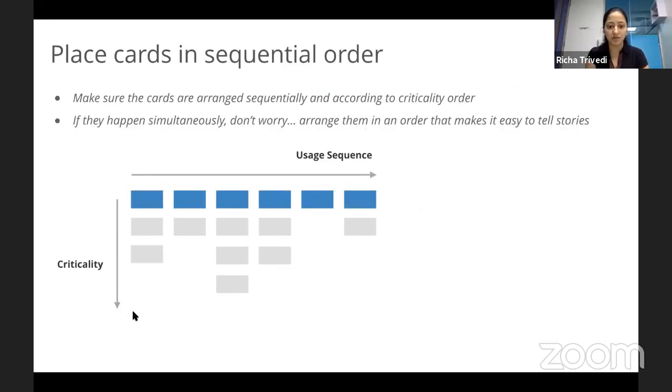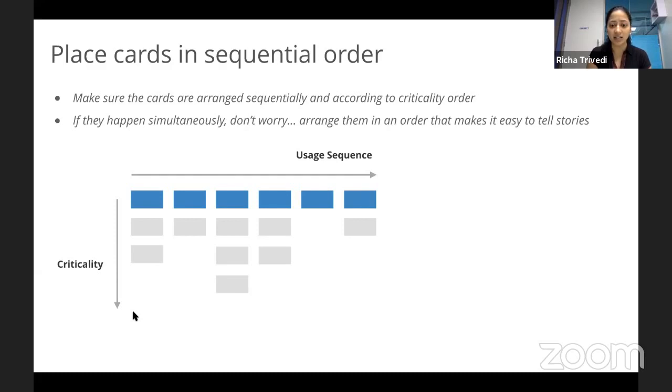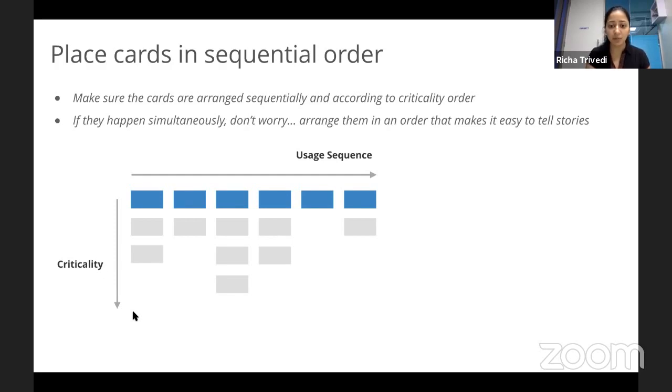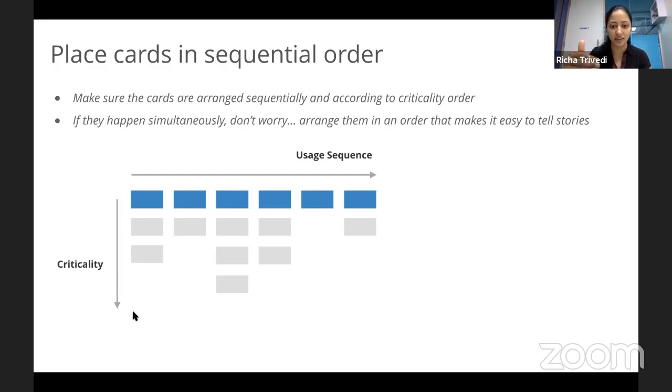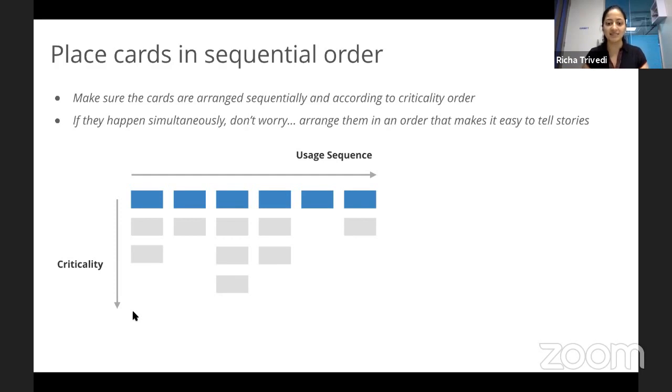So you have a beautiful story map with goals, activities, and tasks. Hopefully you've arranged them in a sequential order. Sometimes you may come across certain situations where you feel like these activities are happening simultaneously. You know, what do I do? It doesn't matter. For example, whenever you confirm an order, multiple things happen in the background. The restaurant gets notified, the delivery person gets notified and multiple things happen. It's okay. Just order it in any way which makes it easier for you to narrate stories.